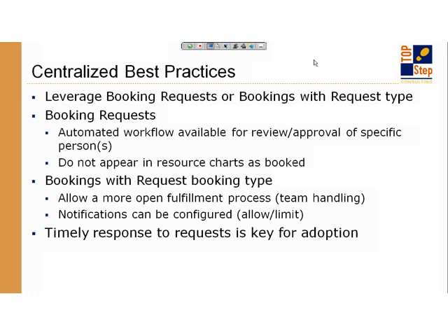So what I see more often is people doing straight bookings with a special booking type called request. And the advantage here is you actually can sort of grab or hold on to someone that you want, or leverage more of a generic resource process. And it does get reflected that someone has asked for this person while that negotiation or that fulfillment is going on.